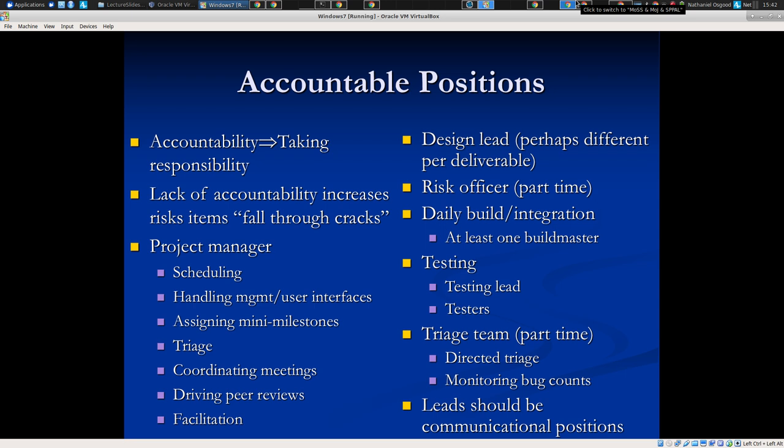Like the manager says, how long is this going to take? And the tech lead said, well, I think it's going to be 2 to 4 months. And the manager says, that's too long. How long is it going to take? Well, maybe we could do it in 6 weeks to 2 months. That's still too long. You'll do it in a month, and I'll give you twice the number of people to do it. Bad news. And then it fails to deliver in a month, and guess what? It's just a failure. It's over budget, it's over schedule.